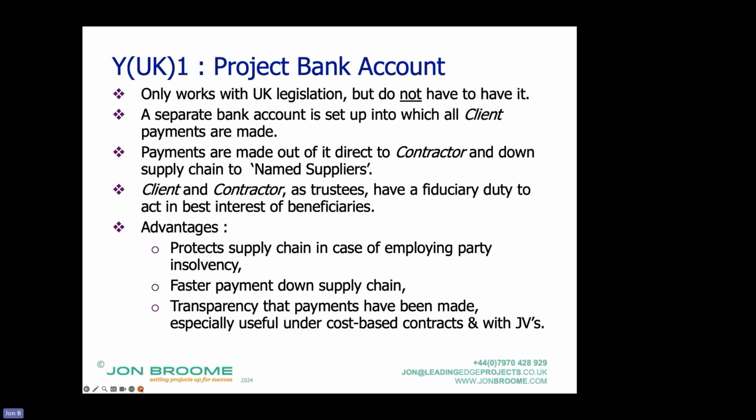And that is even more useful under cost-based contracts, because the client can say, I've paid this money in, have you paid it out? Yes, you have, I can see it. And with JVs, for instance, joint ventures, where you don't want to be looking at two company accounts and two different procedures, there's just this bank account. It's paid into that bank account, and as well as being distributed down the supply chain, it's also paid out to the JVs, the 2 or 3 contractors who form part of that joint venture.